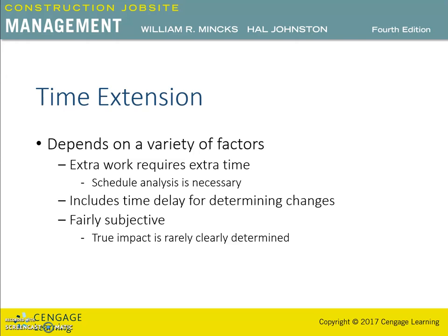The project may be delayed in determining what change is necessary, which also should be included in the requested time extension. Most time extension requests are fairly subjective, as the true impact of the change is rarely clearly determined. A discussion and negotiation of the time extension is a frequent occurrence in the change order process.